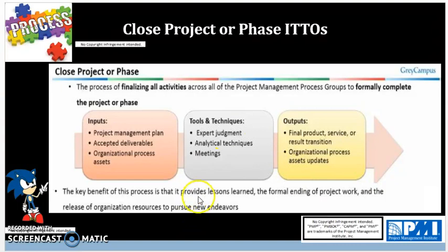So the key benefit of this process is that it provides lessons learned, the formal ending of the project work, and the release of organizational resources to pursue new endeavors for that project as a whole, not for the phase. Once the phase is over, you still hang on to your resources until all phases within the project are done. Then you release your resources. So keep that in mind.